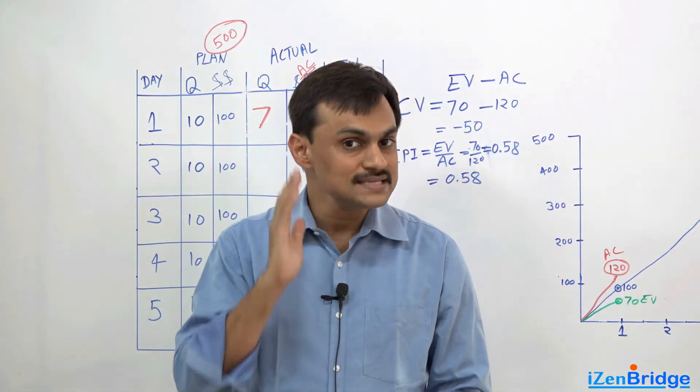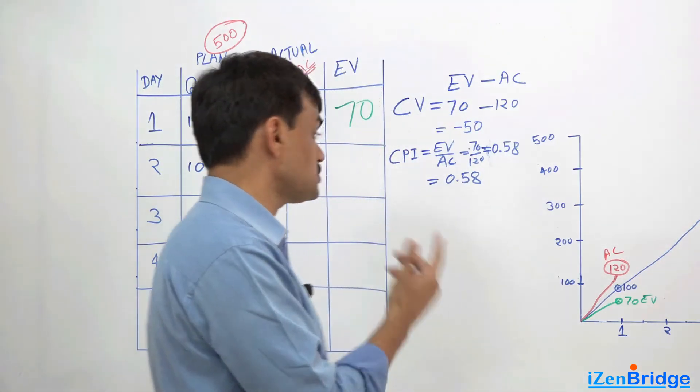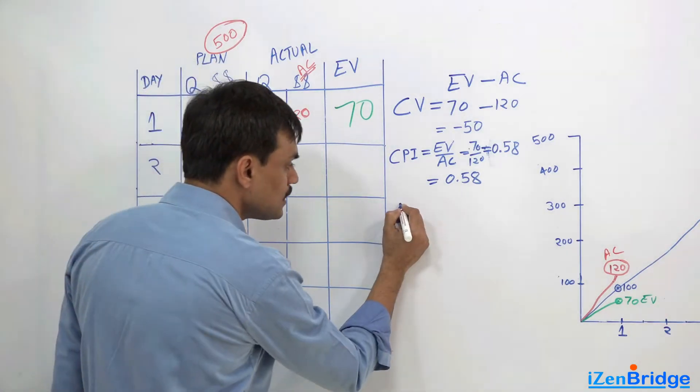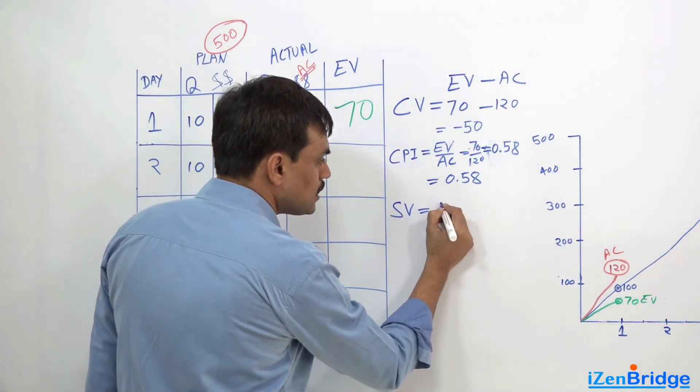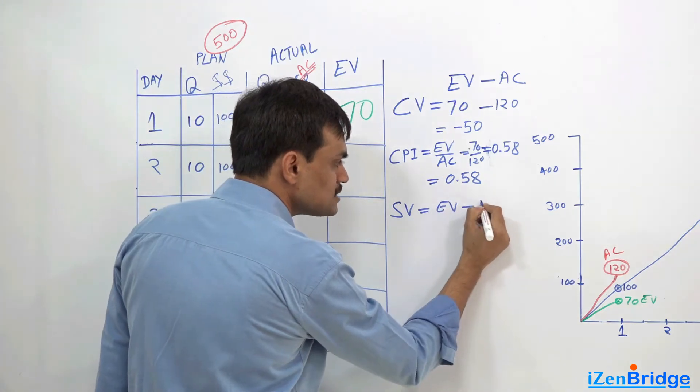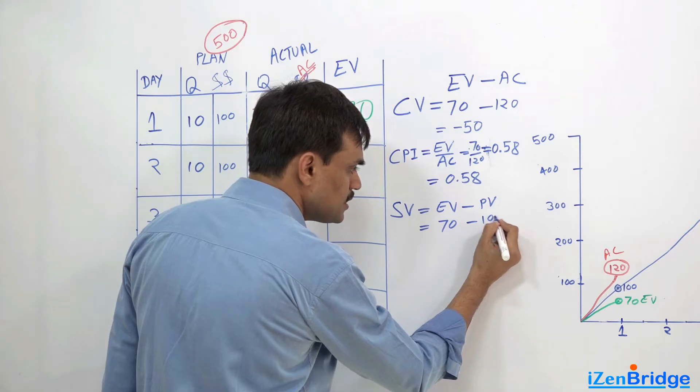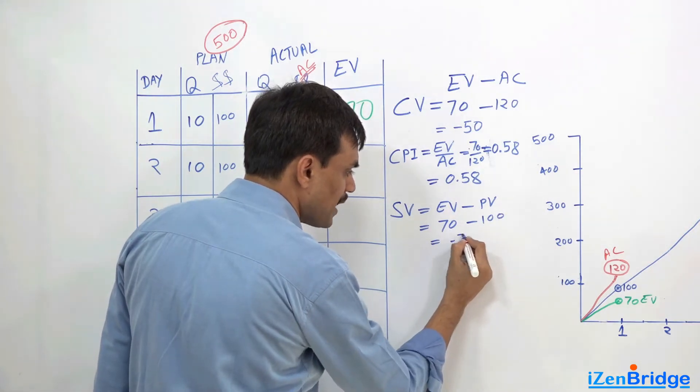So this is how we can make sense by using cost performance index. Now we also have something scheduled variances - we call it earned value minus planned value. In this particular case, 70 minus 100 equals minus 30.